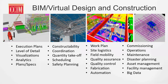Within the model, work plans, site logistics, and field mobility are all things that the construction professional can plan at a really high level of detail, including quality assurance and quality control — because you can walk through the building with augmented reality glasses comparing what's actually been physically built back to the original model as the baseline, and instantly red-flag places where there are issues. The model is so hyper-accurate that you can go directly from the model to fabrication. There are multiple stories now of going directly from the model to fabrication in the field with zero rework. The level of automation is going up greatly because the model is accurate and we trust the model.